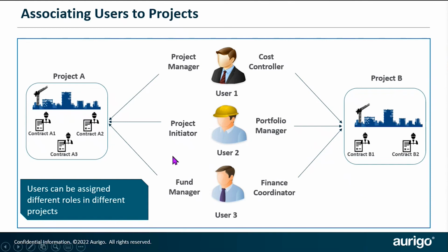So if user one is going to be a project manager and cost controller, they need to already have those roles assigned to them on their user account. You cannot go into a project and say, oh, I need him to be project manager, and try to assign him the project manager role if he doesn't have that already on his user account.